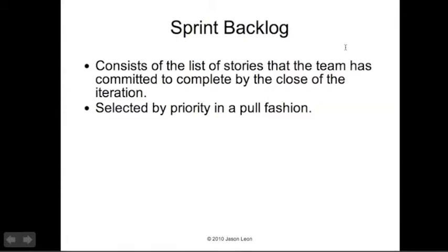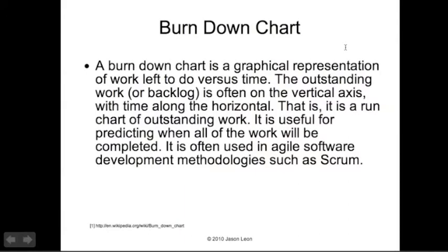Sprint backlog, simple. It's what we're working on during this iteration, and it's like a pull fashion. I like to have the Scrum team members actually pull their own projects if possible, because they're the most empowered when they've selected what they want to work on, and I think it just makes for a better experience in general.